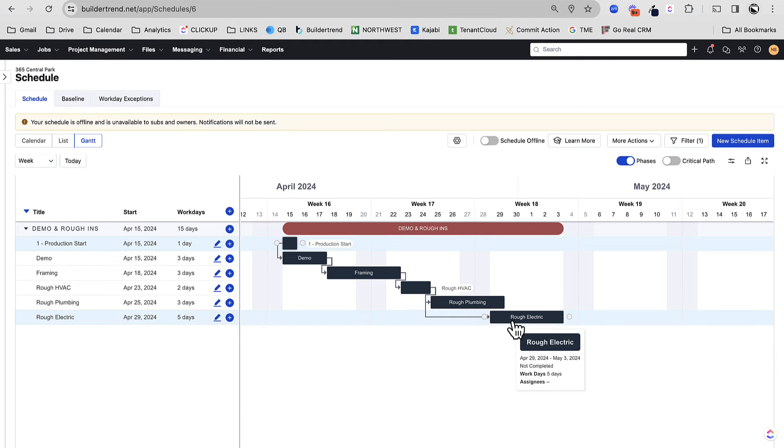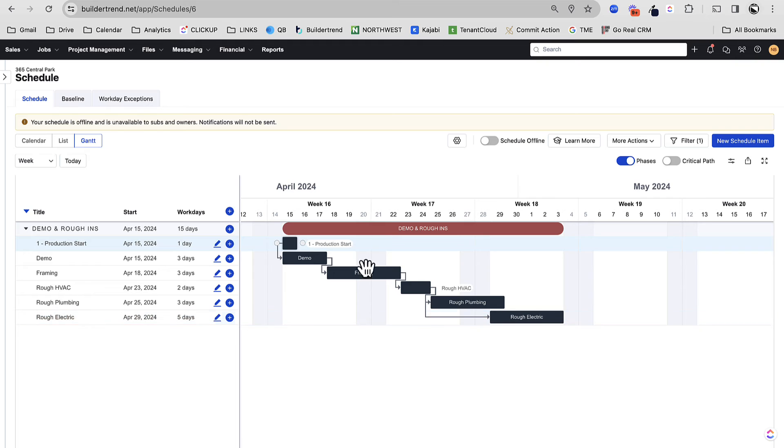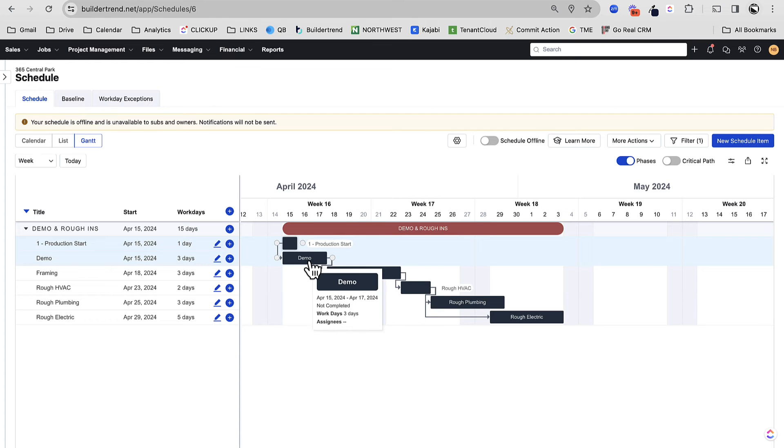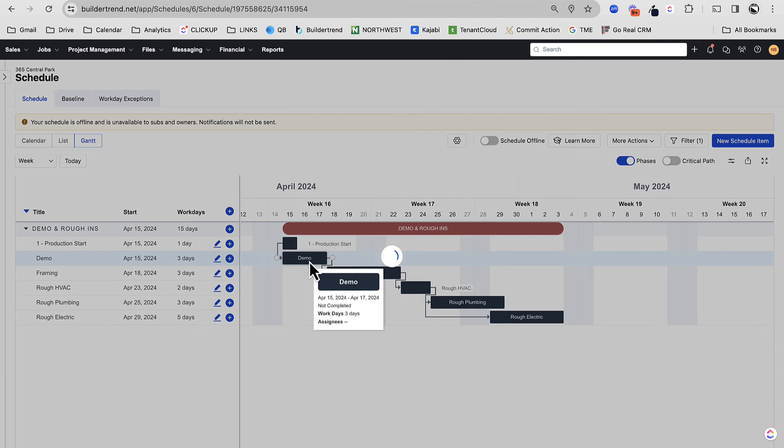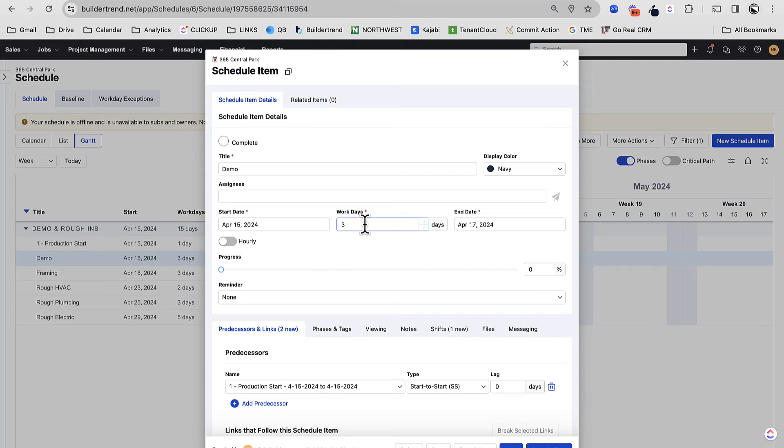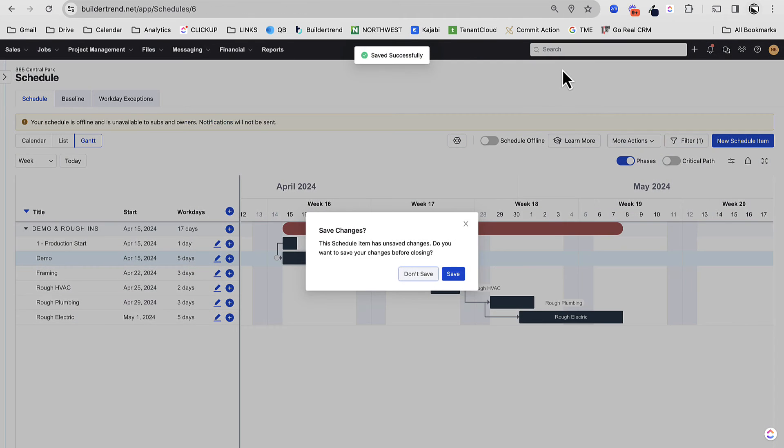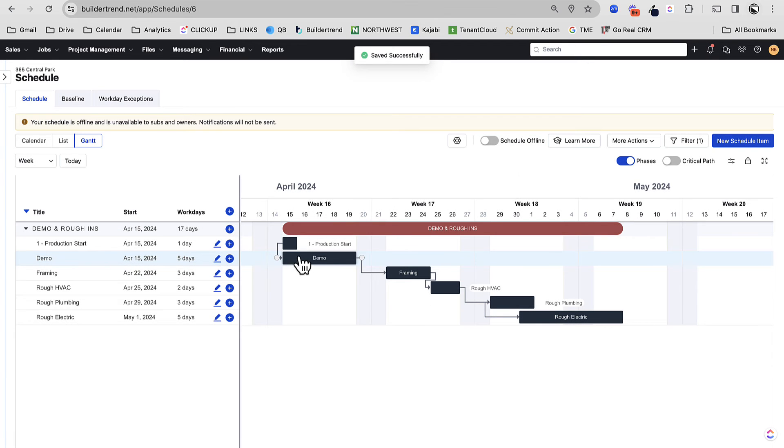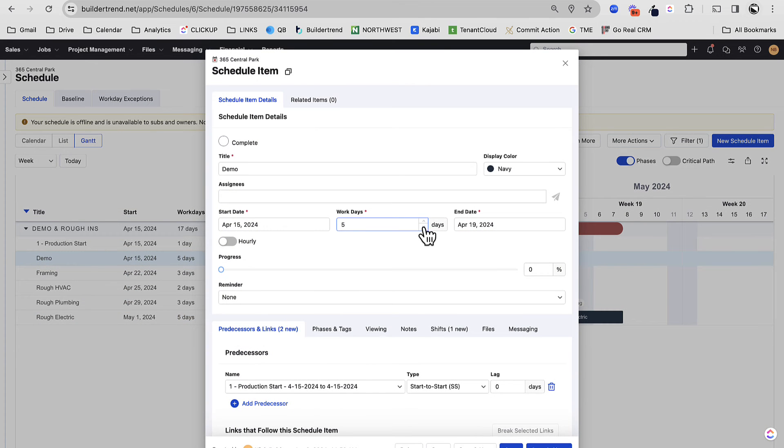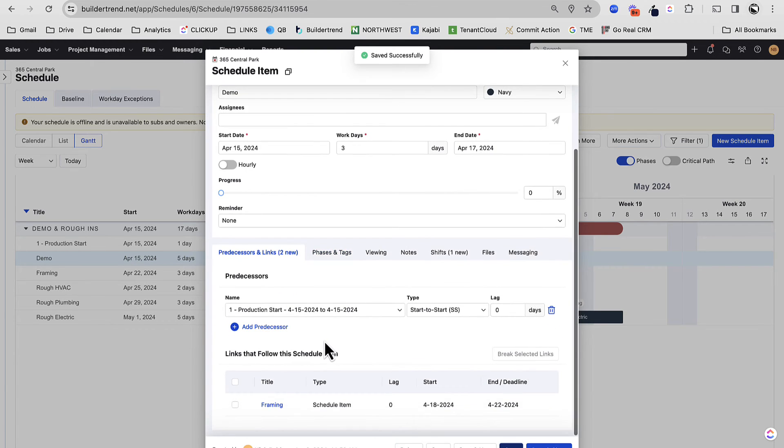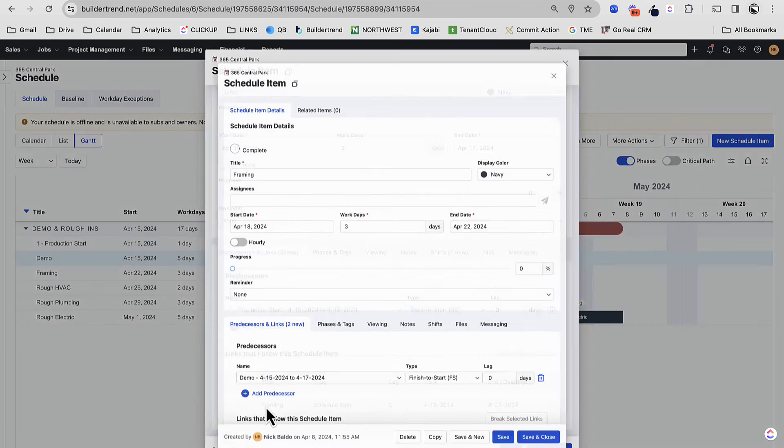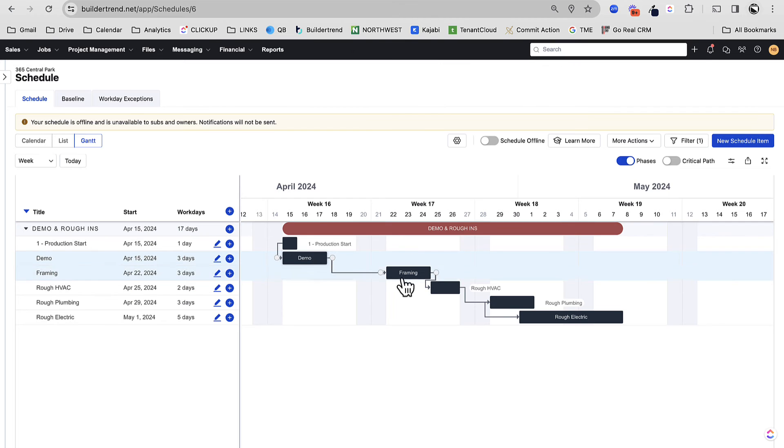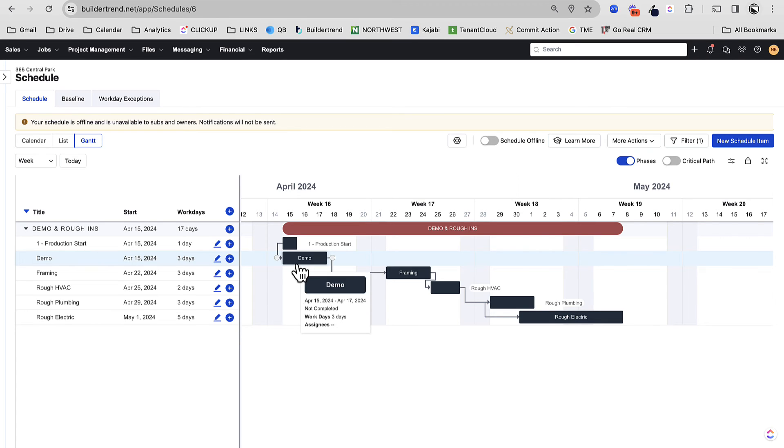So there we have demo to framing, to rough HVAC, to rough plumbing. And then here's my start to start. Now I mentioned adding a lot of slack in here. And I definitely encourage you to do that. You can add slack in a couple of ways. One is on the duration of the tasks or two is on the dependencies. I kind of go back and forth on how this works. Lately, I've been doing it more on the duration of the tasks. So demo, maybe we think it's going to take three days, but there's some cleanup and then we got to get our framing crew in there. So maybe we just say it's going to take the whole week. I found that that's a little bit more helpful than trying to jam it all in.